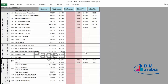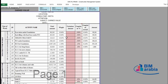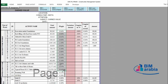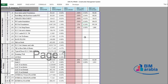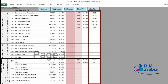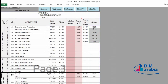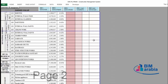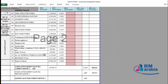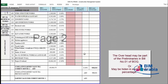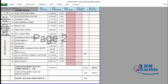CMS gives you the weight for each completed activity. The strap beam shows nearly zero weight because it is very small — only 10% complete, which can be neglected, but there is a value. Here is the earned value for each activity. We also have the project overhead: how much we have paid for the overhead. The overhead paid monthly must also be considered as part of our expense — approximately 8% in the second month.